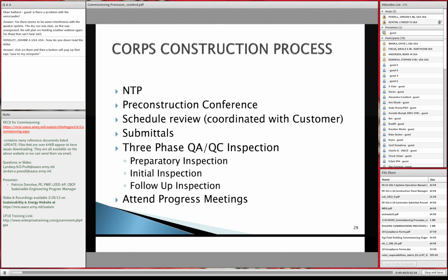We probably have to revisit how we do our submittal register and our specs right now, and see if we need to change some of the components for information only or for review, or maybe add something for commissioning, and that's something that we'll have to take a look at with the commissioning center and see if we need to change that.